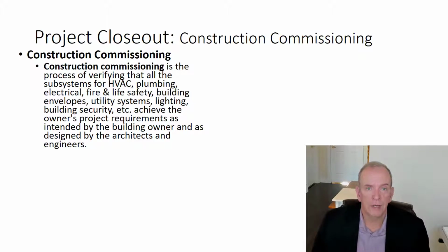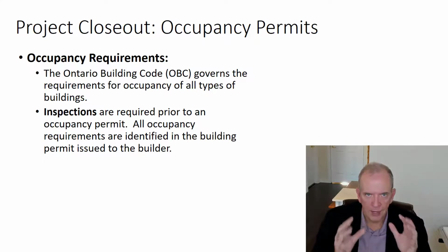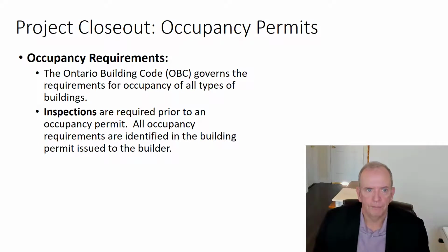And that has to pass, and all the documentation has to be in place. Training materials for the facilities managers have to be done, and the training of the facility managers has to have been done. You must meet all occupancy requirements. Occupancy simply means that the building can be used by the occupants safely. So it's not just completion of the building, it's that the occupants can use it safely. George Brown College, Building E, when we were constructing that, I remember we were very close to not getting occupancy in time. We did get it. We had to have some temporary railings in a few spots and different things like that. It all had to be approved and passed, and you had to have occupancy before you have students in that building.